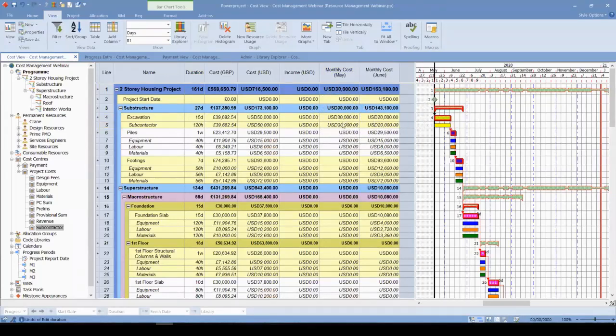You can see, Control Z. It was 30,000 to 20,000 US dollars, but right now with the 20th day of this activity, the distribution is changed. But the total cost is not changed because we said that this cost is the fixed cost. So it is not going to depend on the time. Let's go back and say that this is a 15-day activity.